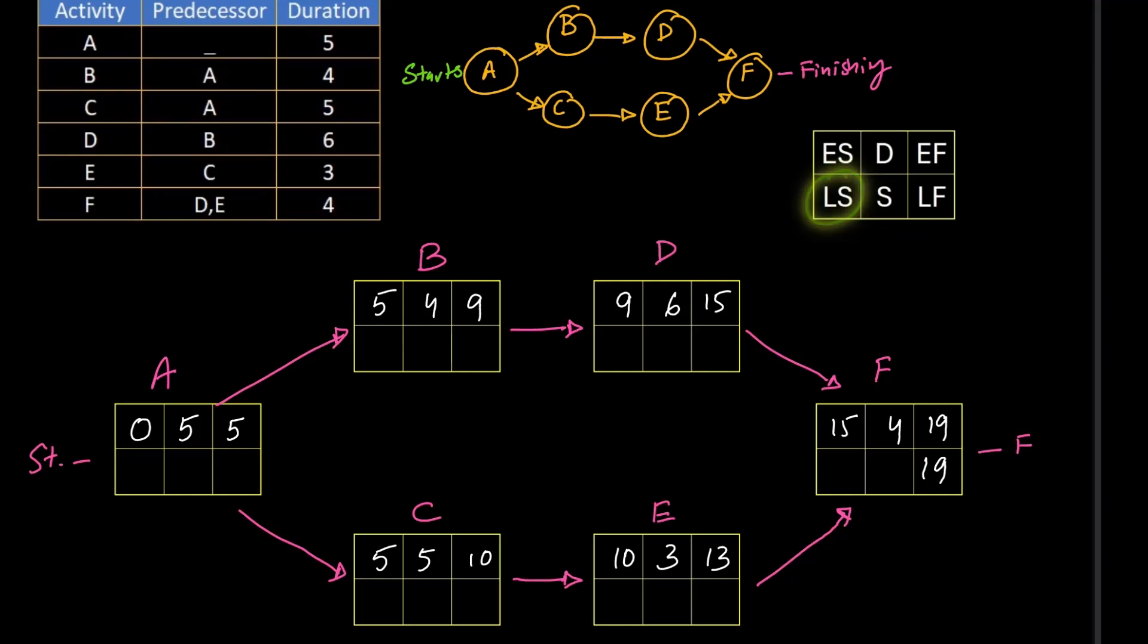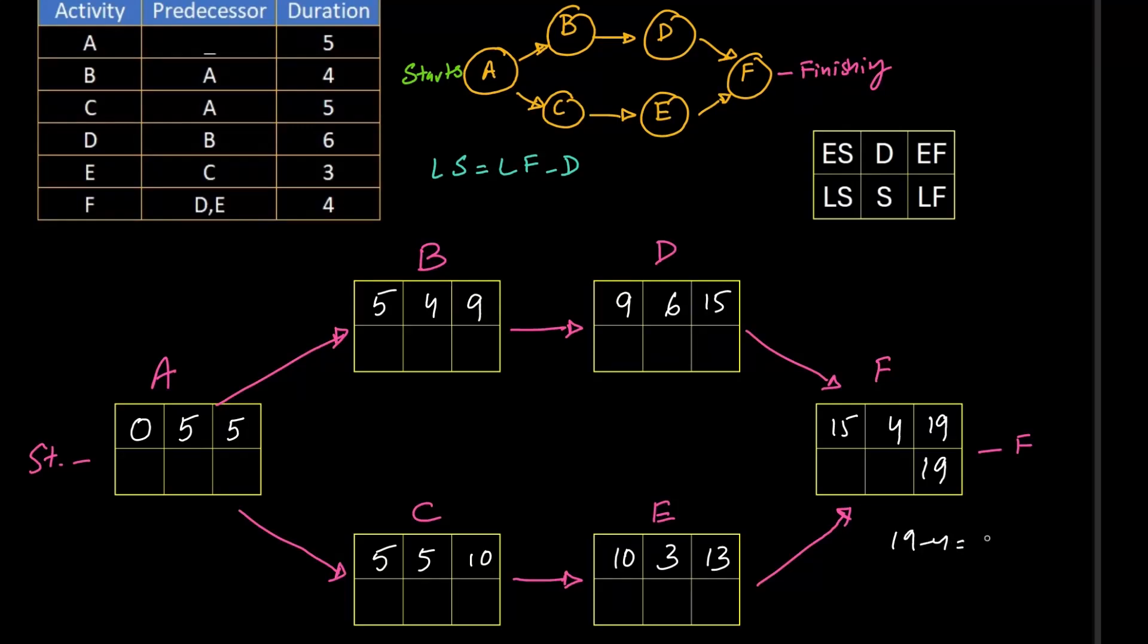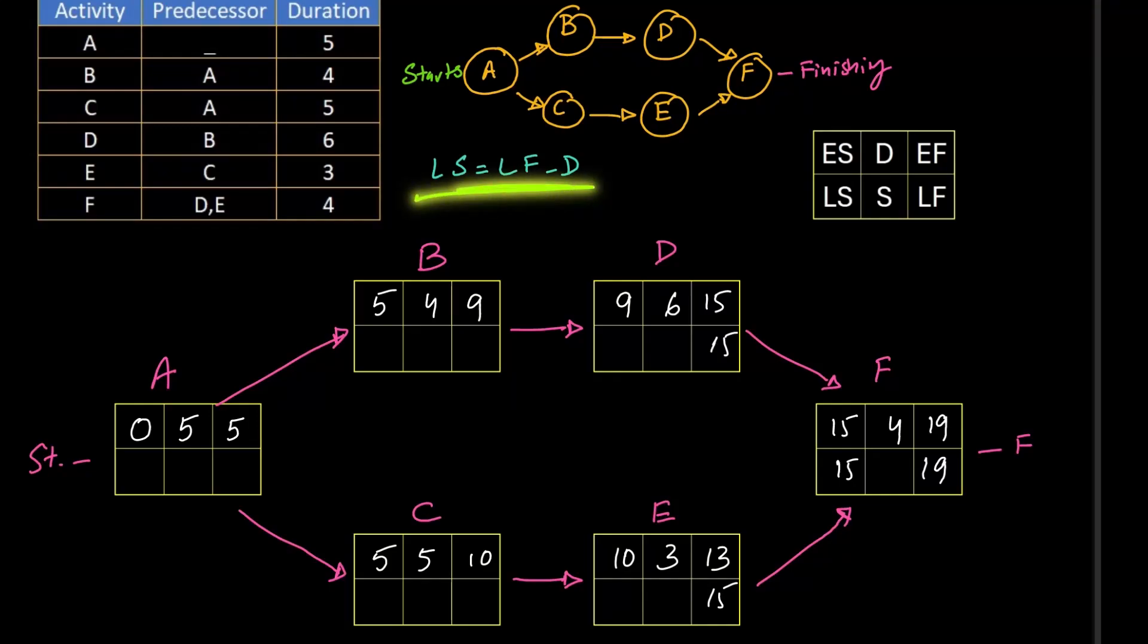We need to find LS. LS has a formula. So LS can be found out by subtracting D from LF. Whatever the duration is, that can be subtracted from the LF. So 19 minus 4 equals 15. We can write 15 in the LS column. Now when going backward in the project, this LS box goes to the LF box of the previous activity. So we can write this 15 here and here. Again making use of this formula, 3 minus 15 will be equal to 12, and 6 minus 15 will be 9. Again similarly, this 12 goes here, this 9 goes to this box.